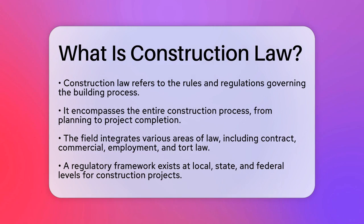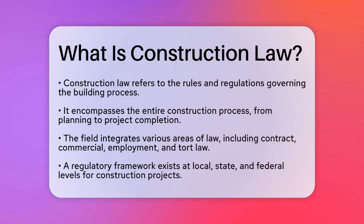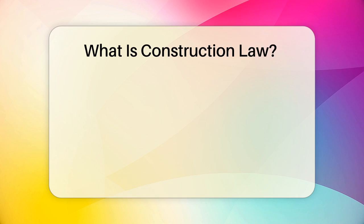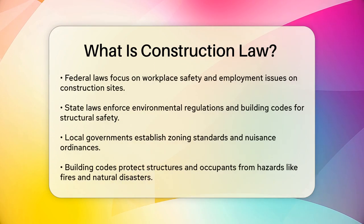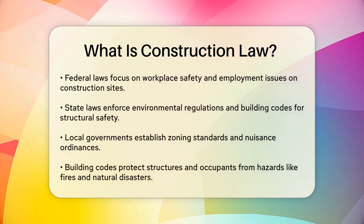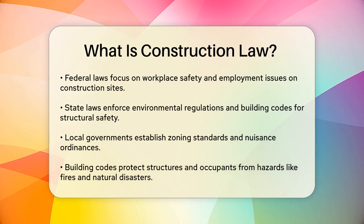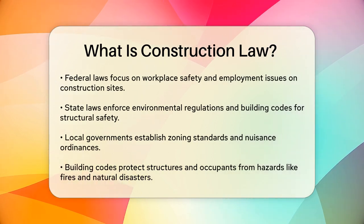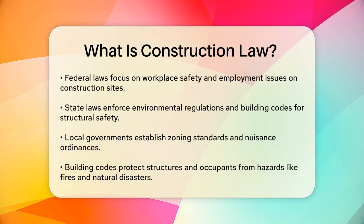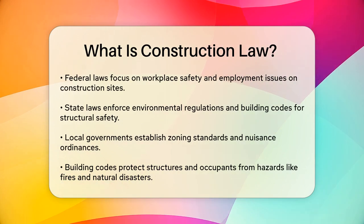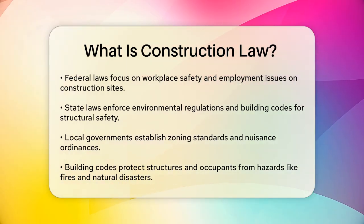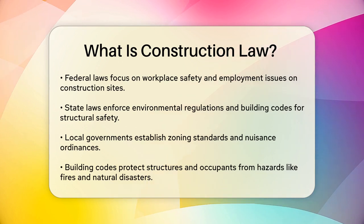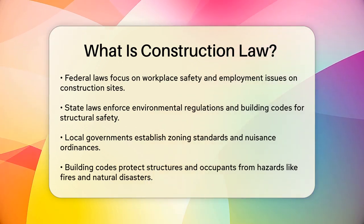One of the key aspects of construction law is the regulatory framework. This framework is made up of local, state, and federal laws that dictate how construction projects must be carried out. For instance, federal laws govern workplace safety and employment issues on construction sites. State laws impose environmental regulations and building codes, which are crucial for ensuring the structural integrity and safety of buildings. Local governments set standards for zoning and nuisance ordinances, such as noise restrictions or the use of heavy equipment.